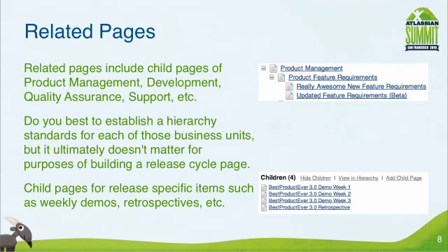And then also for that release 3.0 page, you can put time-sensitive pages, such as we would do a demo every single week after we pushed a test. And so we would create pages that when we went into the demo, you would say, this is what I'm going to demo today, and have links or a URL to your website that you would go in and actually show off what you did. Same thing, we would have retrospectives, and throughout a release, people would add notes to the retrospective page because they would forget if they didn't put those down. So by the time we got to the retrospective meeting, all the things that were on their mind for the release were already added to this page.